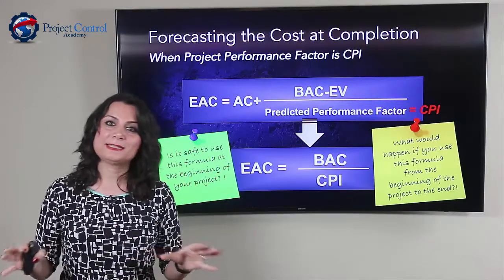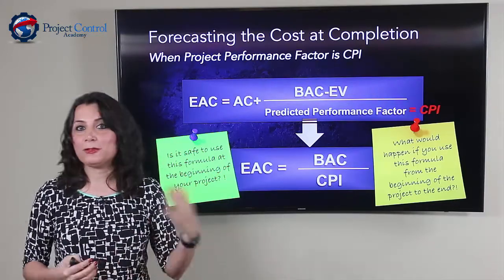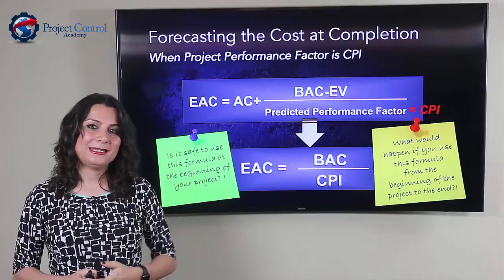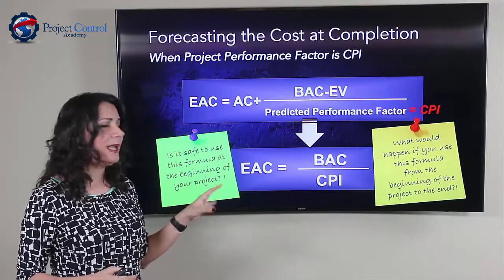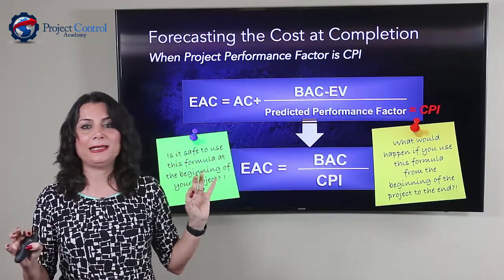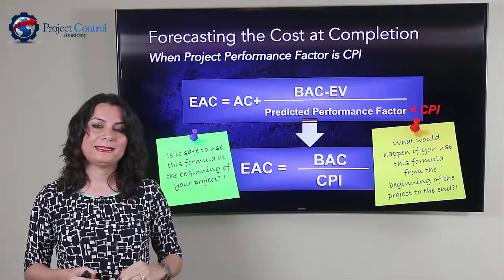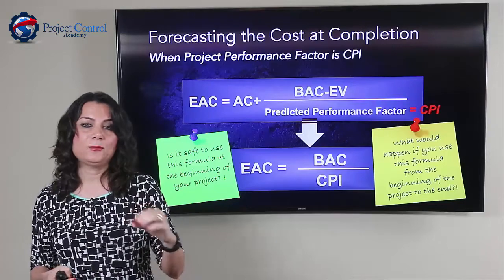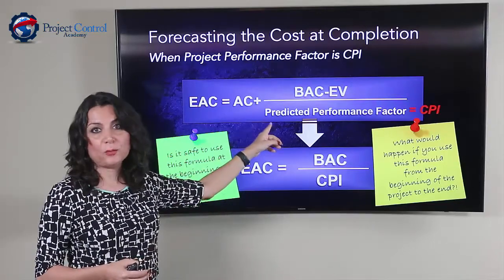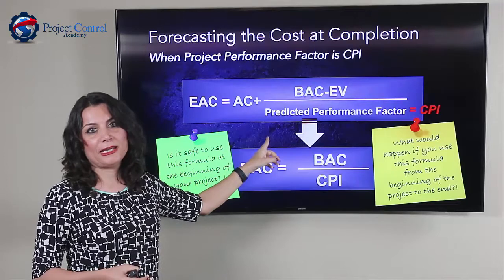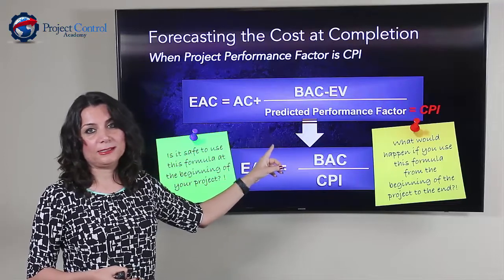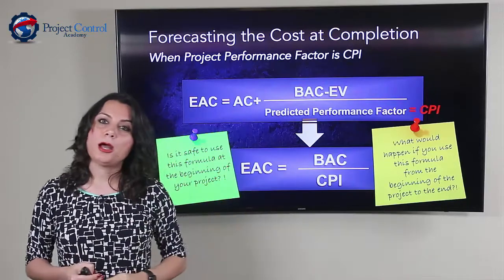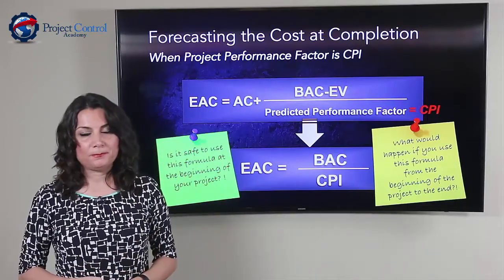But anyways, they were flexible after that. We had discussions with them. We went over the agreement, and we said we don't agree with what you mandated for us in that plan. And we changed that with the agreement with them, and then we came up with a more accurate forecast in the upcoming reporting cycles. And the first thing we did was we didn't take into consideration the performance factor at the early stages of our project, because, as I said, CPI was so low and it was bumping up our estimate, which was not accurate.